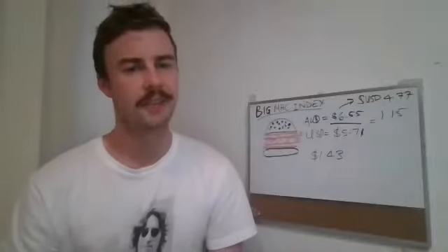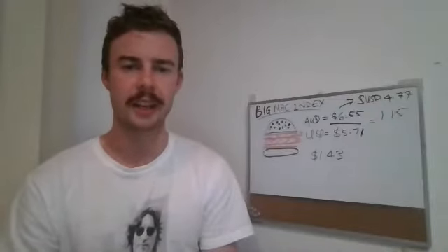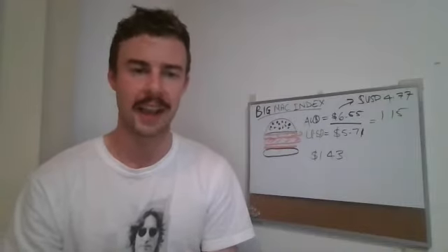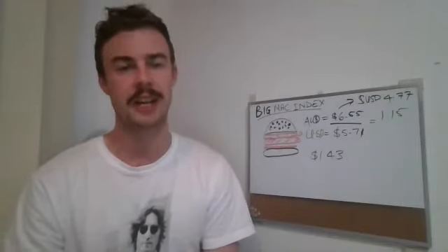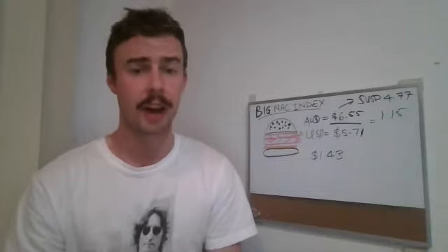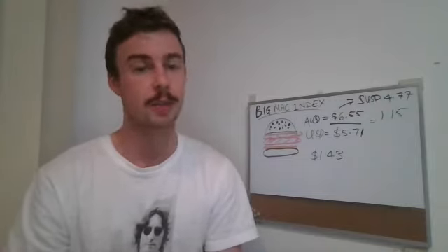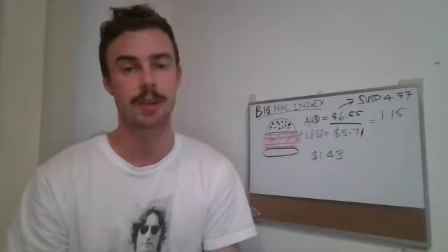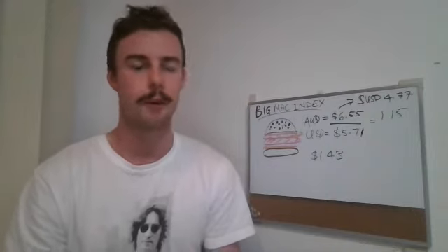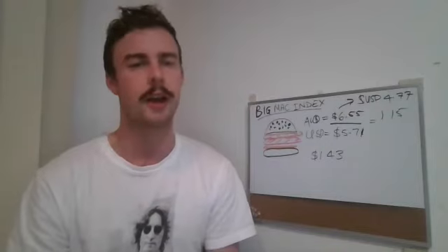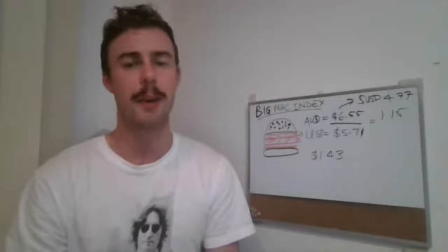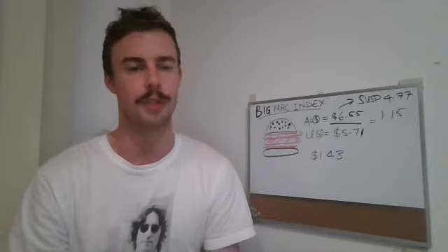Now, in the space of international projects, if working in a country, it is all well and good at a glance to be aware of the country's GDP and GNI. However, this is not going to tell you much about how much supplies and resources will cost you in the country the project is taking place in for budget estimation purposes. For this information, purchasing power parity is a key metric to use.